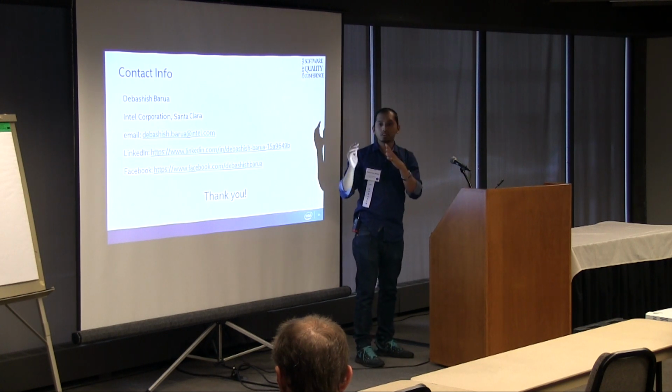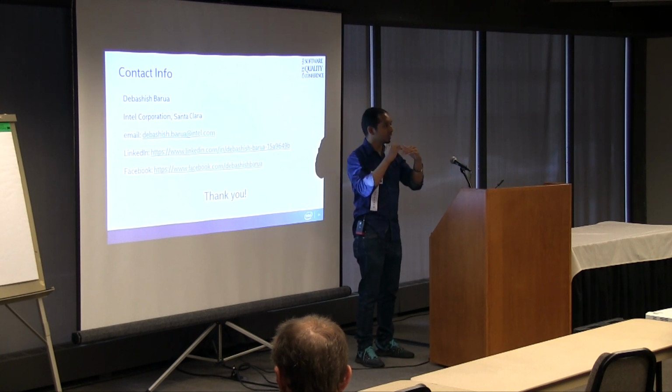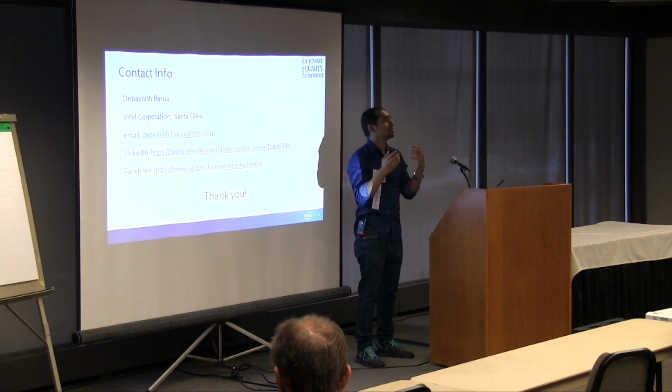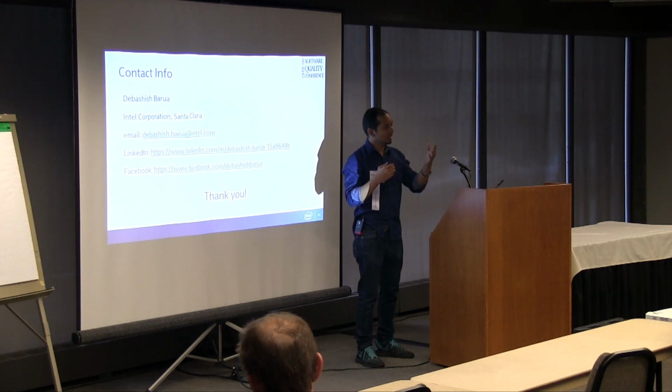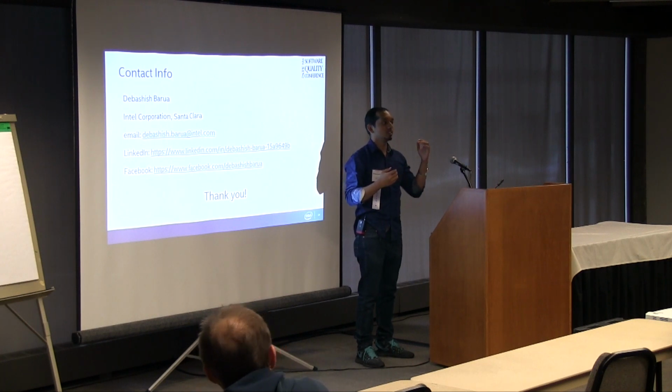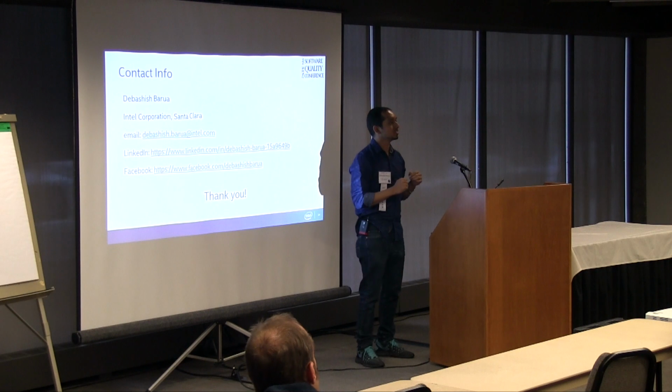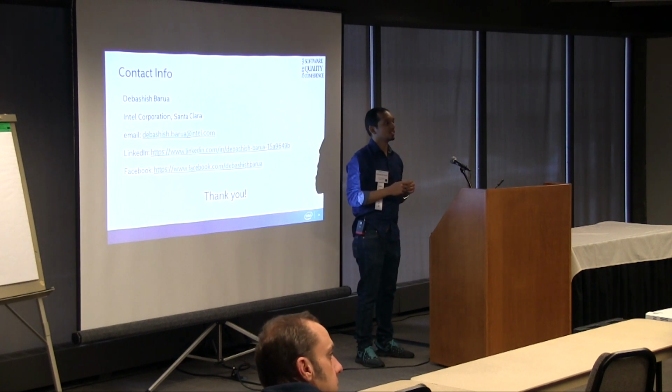So basically, we wanted more leverage with the variables, where the inflection point, asymptote, and this. So this was much easier to get using just the logistic 3P regression model. So with other models, yes, we did try them, but we didn't have that liberty to vary those slopes and the growth rates and all. So that's a really good question.